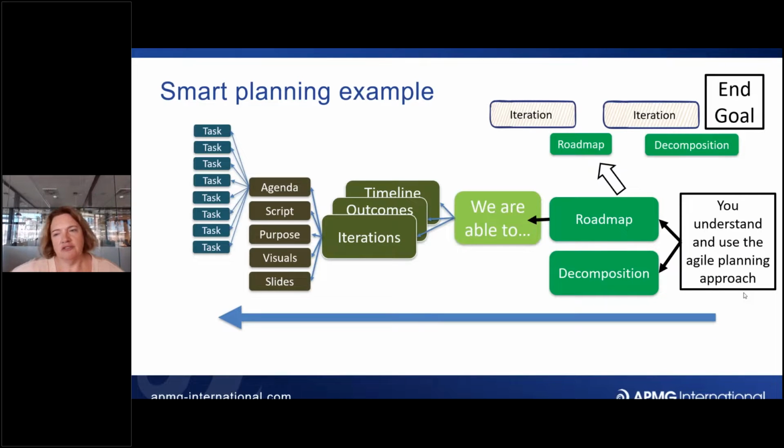And then when I've done that, I'll do the same for decomposition. So I thought about the core points I need to make about roadmap with this caveat, which is what agile is all about. If I get interrupted, if something disastrous happens and I don't get to create lovely slides, I've still got a script. Mark could still have held the event. It would have been a podcast, but he still could have held it.